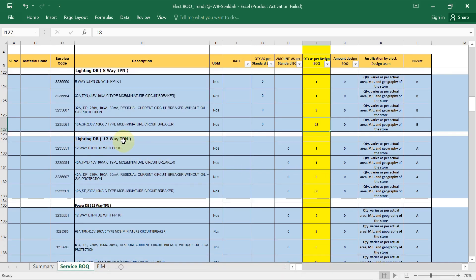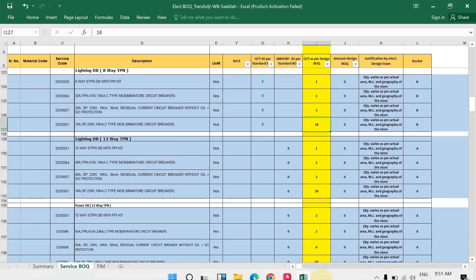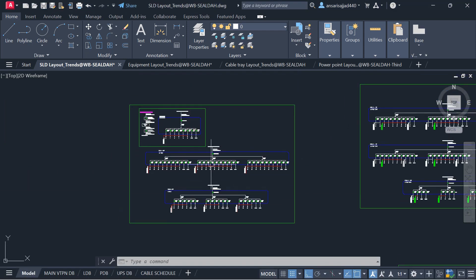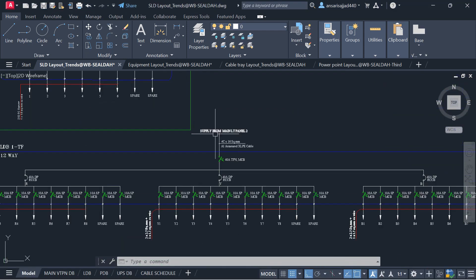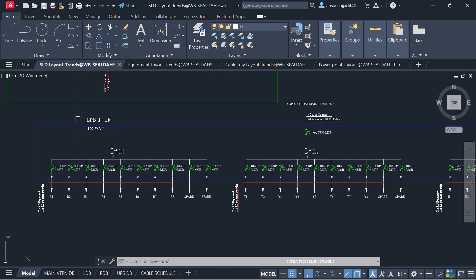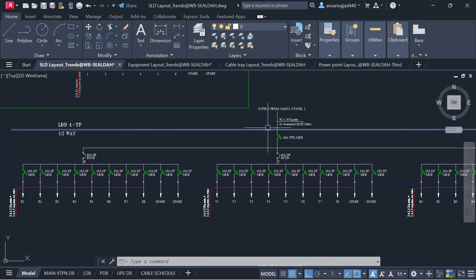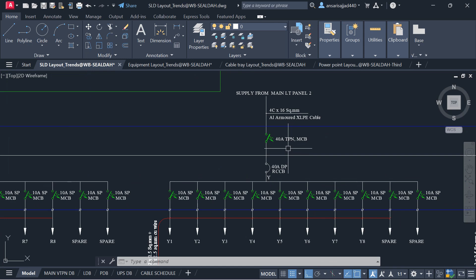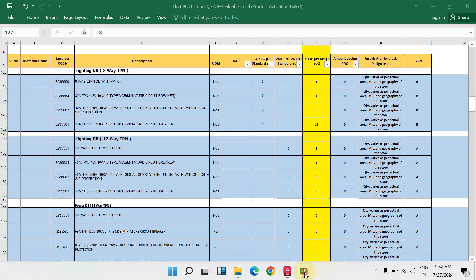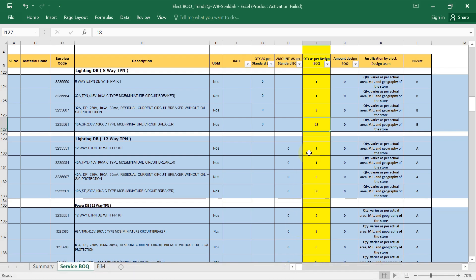Now for the next lighting DB — the 12-way TPN DB. When you open the SLD, for this 12-way TPN DB: the 4-amp TPN MCB quantity is 1, and the 4-amp double pole RCCB quantity is 3. I have written that here.